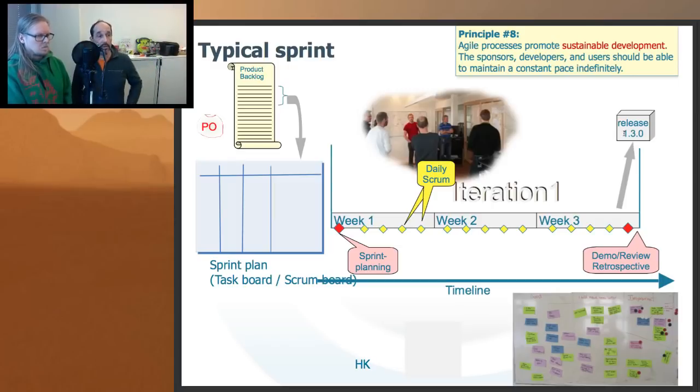The demo session is for this purpose. In the demo session, the customer participates and the team explains the new piece of software or new functionality. It's done in a way that it's not shown just to the customer, but everybody is there, so that there's a discussion to help the team understand, and get the feedback basically.